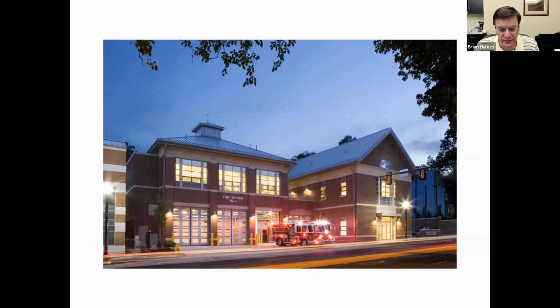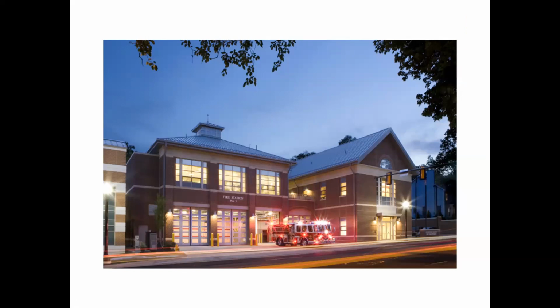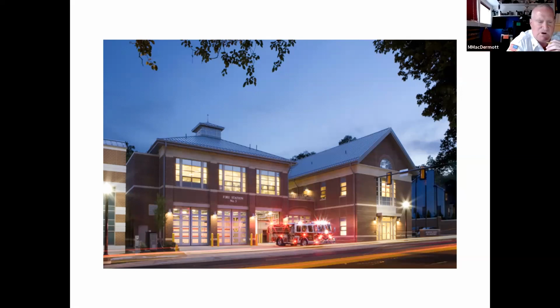I think either door has maintenance associated with it. That was what I was going to ask: if it's double the cost, is it double to get it maintained or fixed, or God forbid replaced? It's a more specialized product, so I think your parts and pieces are going to take a little longer to get. If you have an overhead door, they're more readily available. If you need an operator, they're more readily available to get replaced. When you say double the cost, any idea what a 16 by 16 door is worth? It could go from 15,000 for the overhead to 30,000 for the bifolds per opening.